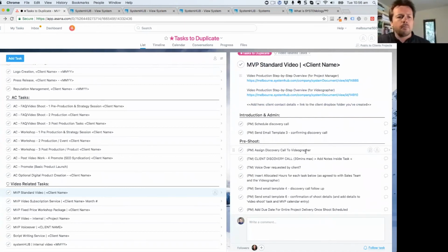And some project management tools can automatically do that as well, like where you have dependent tasks. And I think Asana might have recently added that in. So once something is completed, it triggers off the next step. Right. But for us, typically speaking, we like a project manager to oversee, because we give clients weekly updates, and that's part of the process for them to be able to hop in, see where something's up to, and move anything along that needs to, to make sure that no bottlenecks occur.